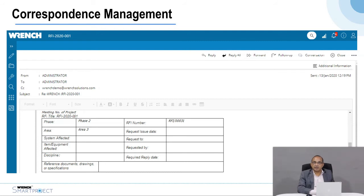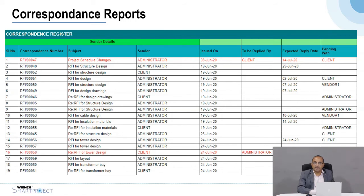Correspondence Management is used for sending communications by email to contractors or consultants for clarifications such as RFIs, or receiving communications that the owner needs to manage. You can create these communications within REN using a template with fields mapped to the database, and a unique correspondence number is generated automatically. The email is sent through your mailing system — Outlook or Google — and replies are tracked to automatically generate reports on what was sent, when a reply was expected, and whether it was received. All correspondence history is stored in REN for easy search and retrieval.